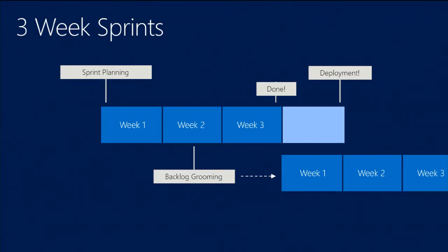The concept of a team is that you're working together. You're showing them the playbook here, and you're getting their input on the playbook. And when we go into backlog grooming, it's not just sitting down and telling the team what we're going to do next. In a lot of ways, it's asking the team if this makes sense. It's getting feedback on the design, and getting estimates for how expensive this is going to be. We story point things, and we take that feedback and work it back into the specs and the designs. So that's a very, very critical step.